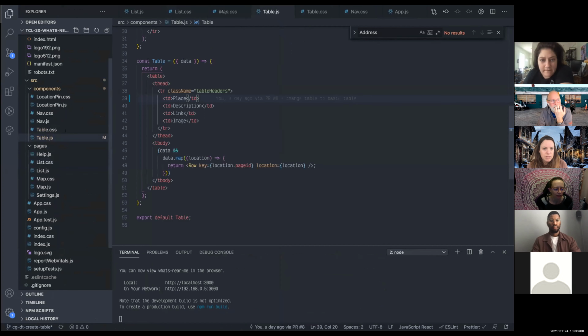And maybe we prove it by just printing out the first thing from the API result or whatever. Then those other stories could stand alone a little better. Here's a rendering context, which is the map, and here's a rendering context, which is a table. And maybe that would have been a way to have stories that more easily fit our goal of 3 to 5 days, whatever it is.